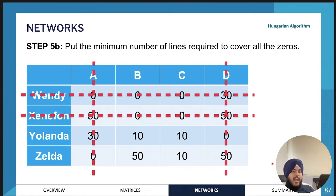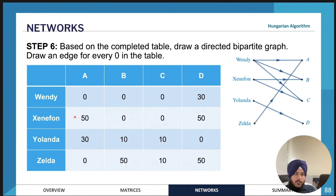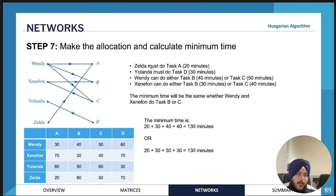Now if you draw the minimum number of lines it will be four, meaning you're done with the Hungarian algorithm. The zeros indicate the tasks each person can perform in the minimum amount of time. Wendy can do tasks A, B, and C in minimum time; Xenophon can do tasks B and C; Yolanda can do task D; and Zelda can only do task A. Drawing a bipartite graph here is very helpful. Since Zelda can only do task A, she must be allocated to task A — that's 20 minutes from the original table.